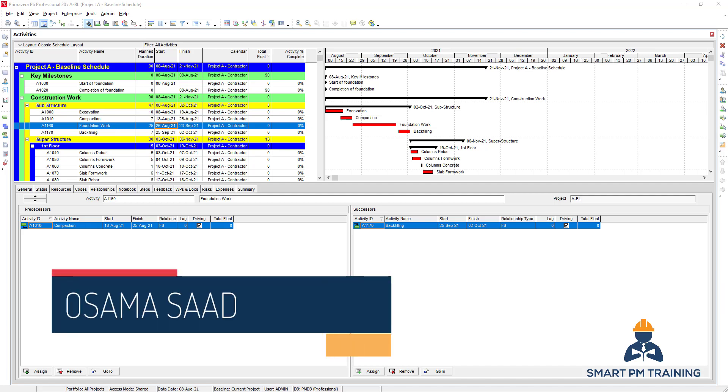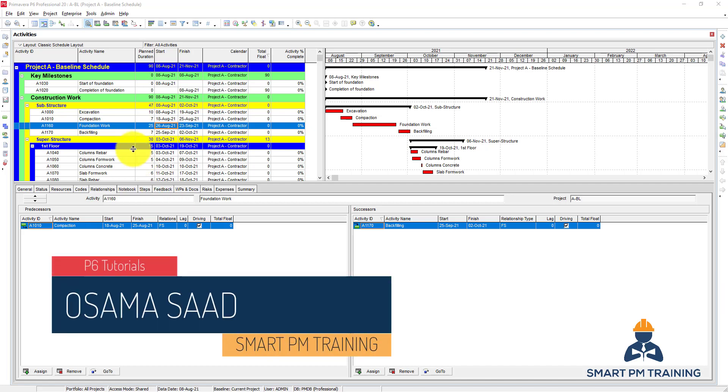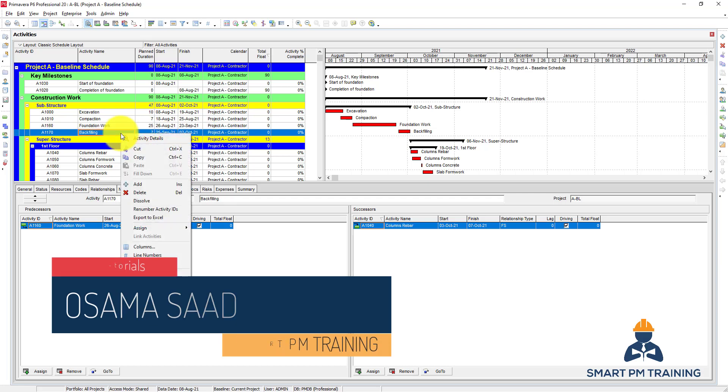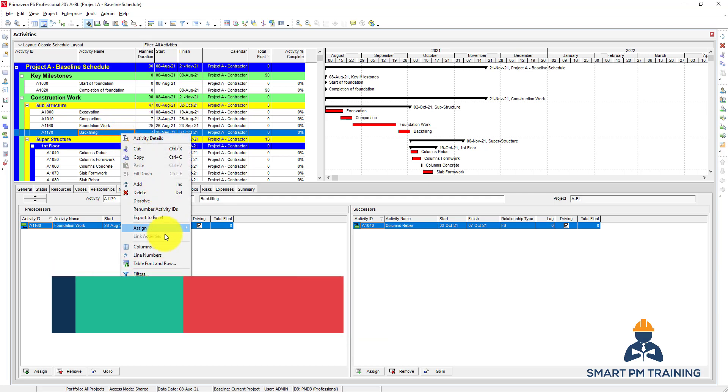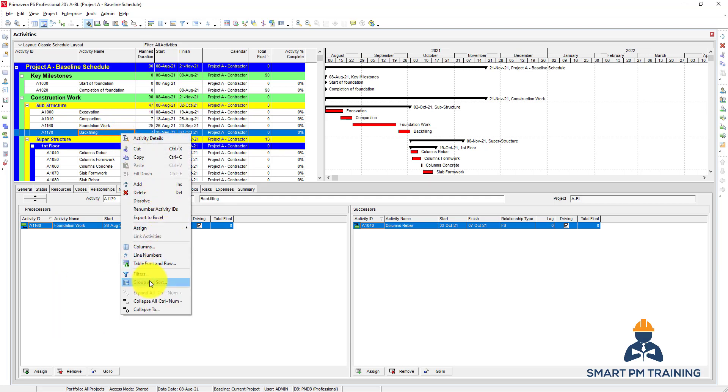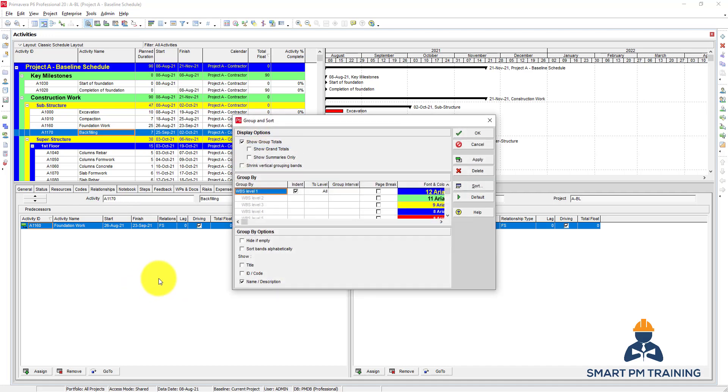In this video we will talk about grouping and sorting formatting options. To group activities, right-click, group and sort. By default, which is the most common way, is to group by WPS because it gives you a good idea about the structure of the scope of work.